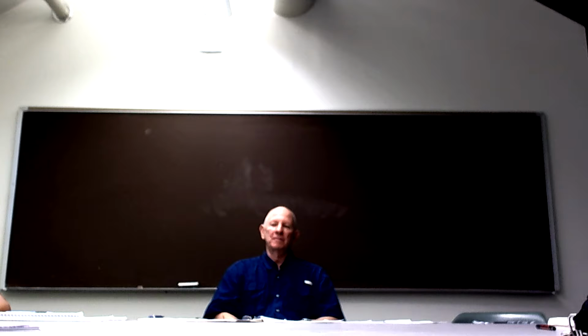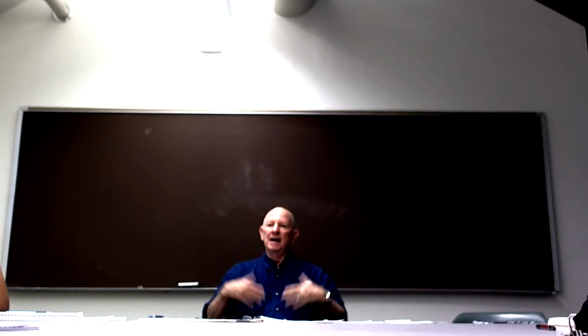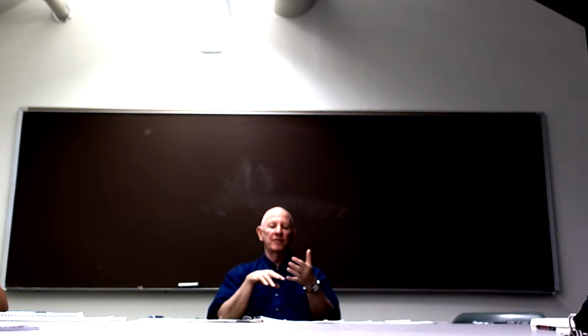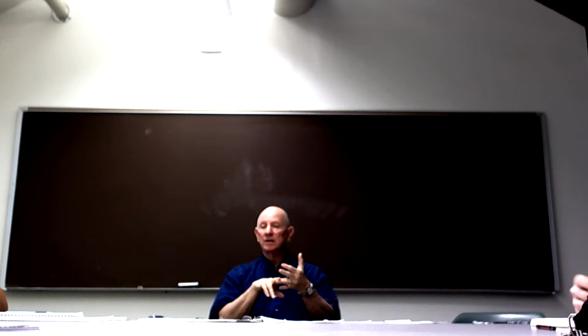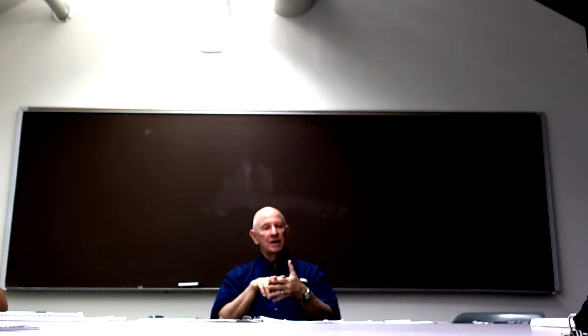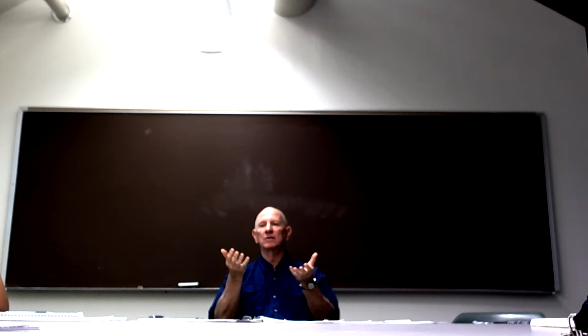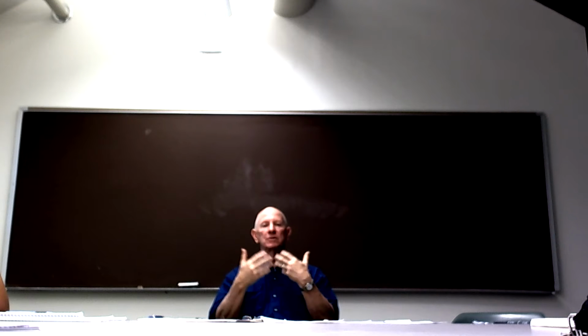And so the committee isn't there to make things smooth. The committee's there to help you do a good thesis. And sometimes that means a bumpy ride. And managing that ride is part of what you're supposed to be navigating in the thesis passage. So the most important thing to me is you decide when those encounters are. You decide what the agenda is for each of those encounters. You run the meeting. You take minutes. You take the input away. You think about it. And then the next meeting, you tell them what you did about it. It's your thesis. You're in charge of it.